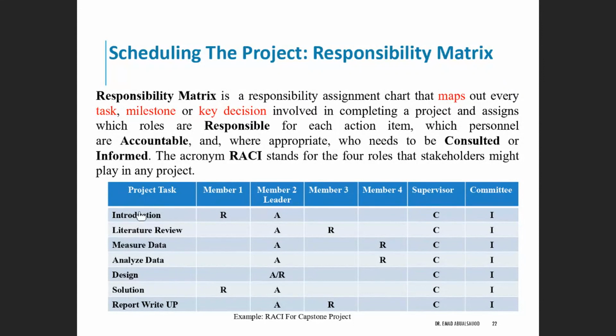In this case, for example, the introduction, where I assign it to member 1, he will be the one responsible to do it. Literature review will be member 3. Member 4 will do the measurement and analysis of the data or the collected information. Member 2, who is the leader, will do the design. As he is accountable, he will also be responsible for completing the design activities.